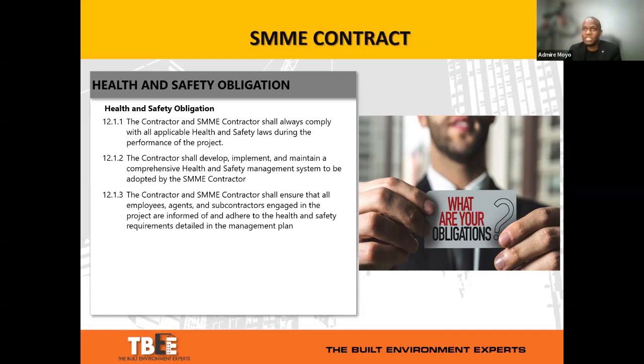With respect to health and safety, in terms of the Health and Safety Act and regulations, those responsibilities are cascaded to the main contractor, and then they're also obviously cascaded to the SMME contractor. But again, there's that principle of mentorship that's implied in, for example, clause 12.1.2, where the contractor develops, implements, and maintains a comprehensive health and safety management system to be adopted by the SMME contractor.